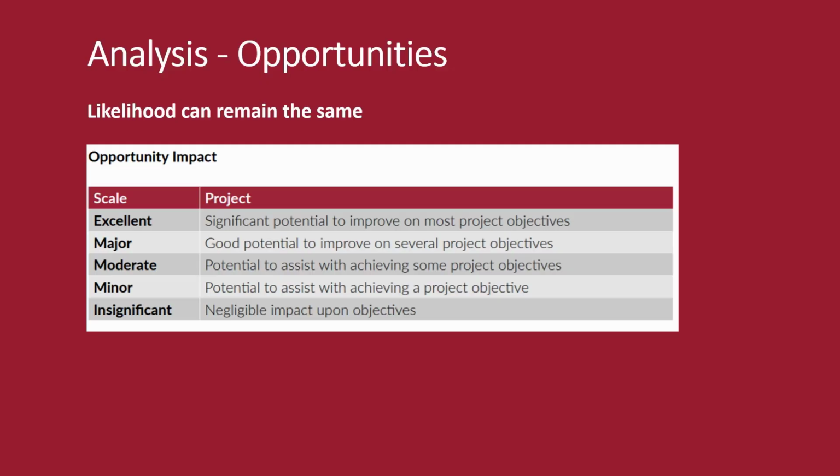Analysis should be undertaken as part of a risk identification workshop to reduce potential bias. That said, if there is debate, go for the high level. All this will do is lift the risk up the priority table. Analysis should be a quick affair. There is no value in having a long debate. The combination of likelihood and impact enables a rating to be applied to each risk. Risk ratings help to prioritise what risks to work on first.